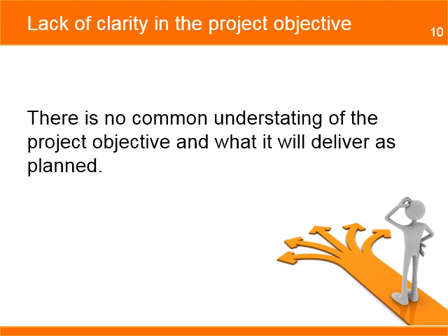You reply that the problem that might have significant implications is the lack of a common understanding of the project objective. As reported by the team, it seems that everyone involved in the project has a different idea of what it will deliver. The initial information shared by the project manager seems to have lacked clarity in defining the project objective. In addition to that, there were many changes proposed by stakeholders that were considered in the last 3 months. The decisions were not communicated, and that created the impression that they were approved, thus increasing the original scope of the project.